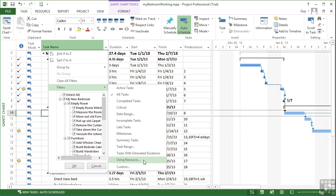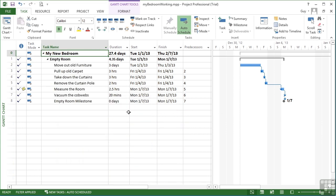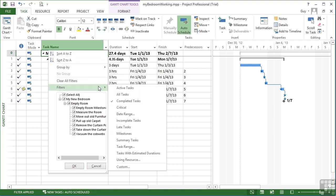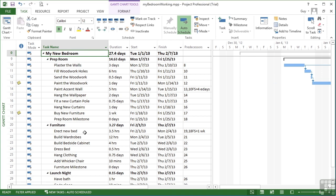Notice the three dots will give you a dialog box to choose that resource from. If I were to choose completed tasks I would only be then presented with the completed tasks. In our bedroom working file a number of the tasks have been completed. Back in the drop down I can go to filters and say incomplete tasks and I'll see all the other tasks.